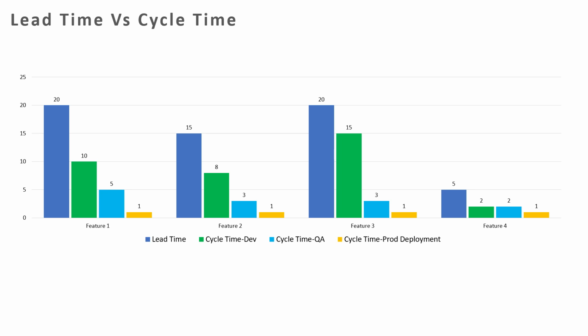15 plus 3, 18 plus 1, 19 days. Only means that only 1 day is wasted, either as wait time or waited in the queue time. Right, yes or no? So with feature 1 and feature 2, the difference is the wait time has been reduced from feature 1 to feature 3.